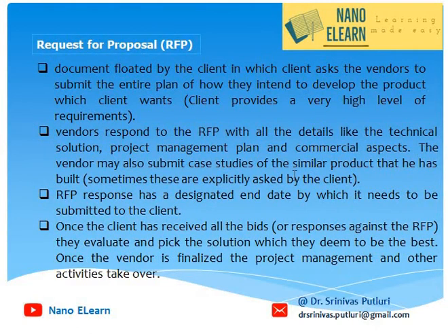Let me explain what is request for proposal, in short termed as RFP. RFP is basically a document that is floated by the client where they ask the vendors to submit the entire plan of how the company is going to develop the product which the client requires, which means that this provides a very high level definition of requirements. The vendor responds to the RFP that is submitted, providing all the details like technical solution, PMP, which is the project management plan, and commercial aspects.